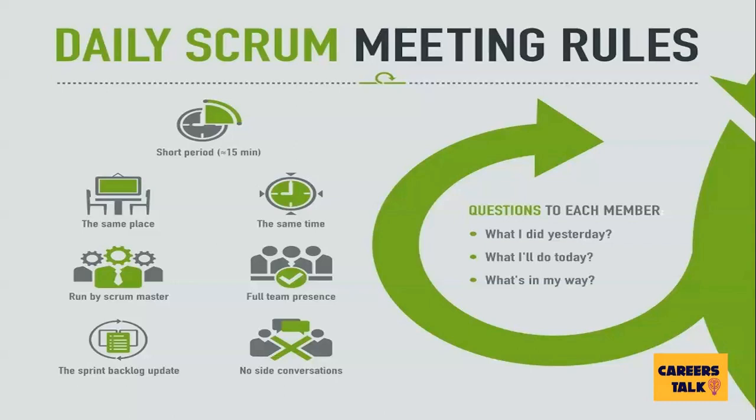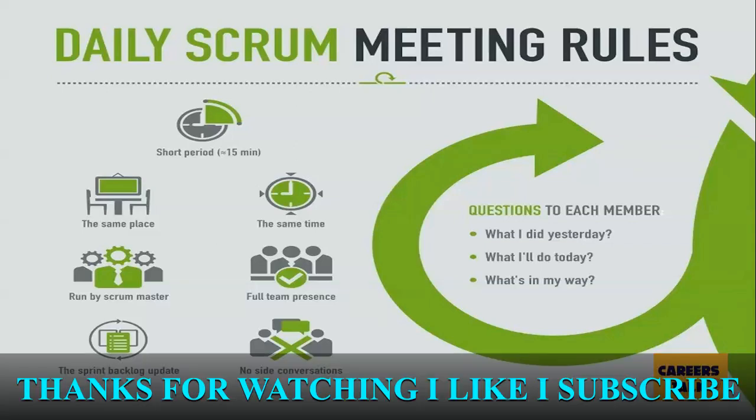All team members are required to attend Scrum meetings. Since both the Scrum Master and the Product Owner are committed team members, they are expected to attend and participate. Anyone else, for example, a departmental vice president, a salesperson, or a developer from another project, is allowed to attend as a passive audience and listen. This makes Scrum meetings an excellent way for a Scrum team to disseminate information. If you're interested in hearing where things are at, attend that day's meeting.